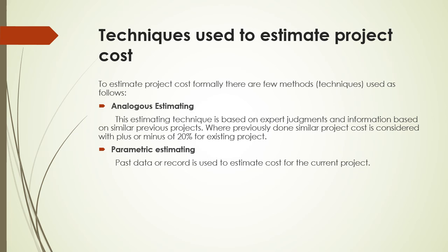We know that one cash register costs 5,000, but we want to upgrade to a stronger, more durable cash register. So, due to the past data of the first cash register, we will know that we have to add at least $2,000 or $3,000 for a better cost estimate.